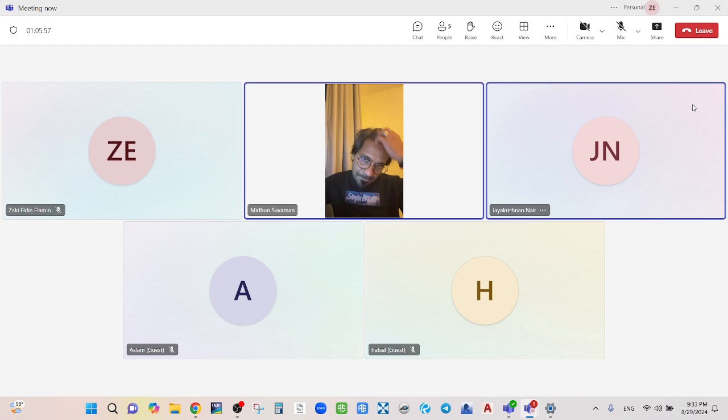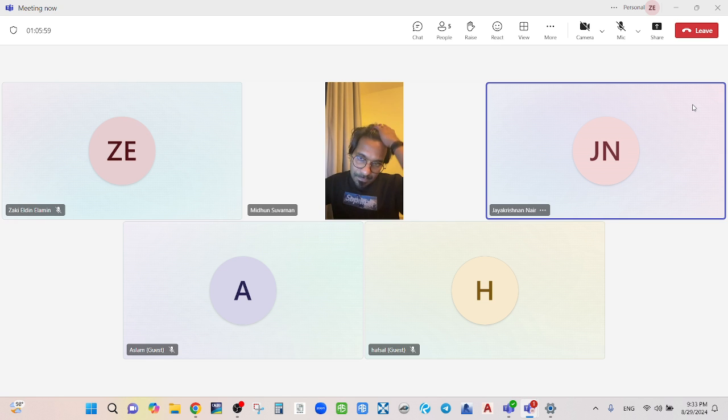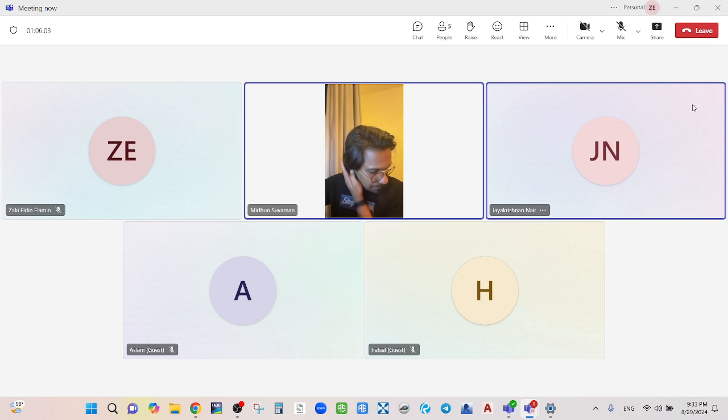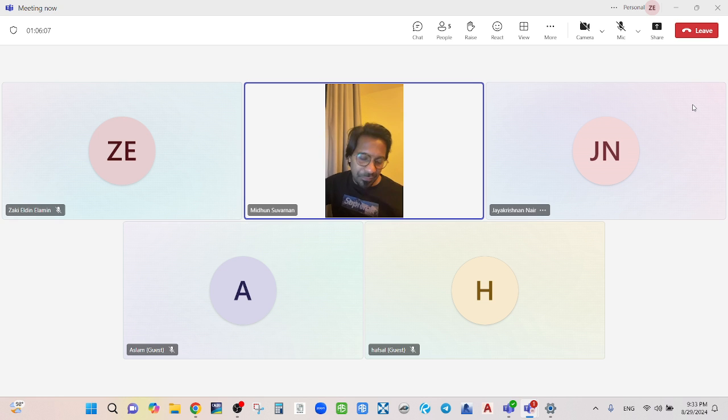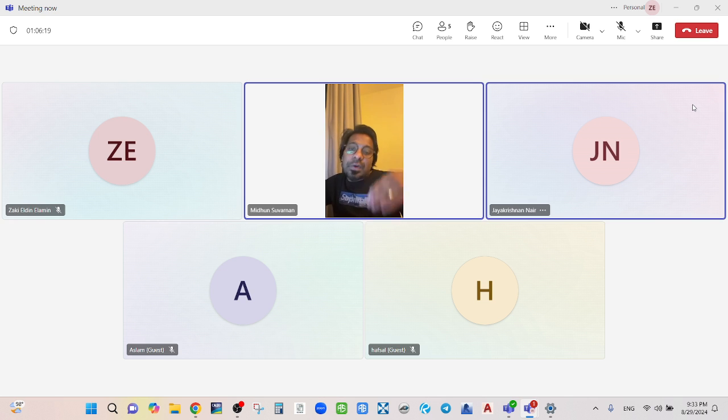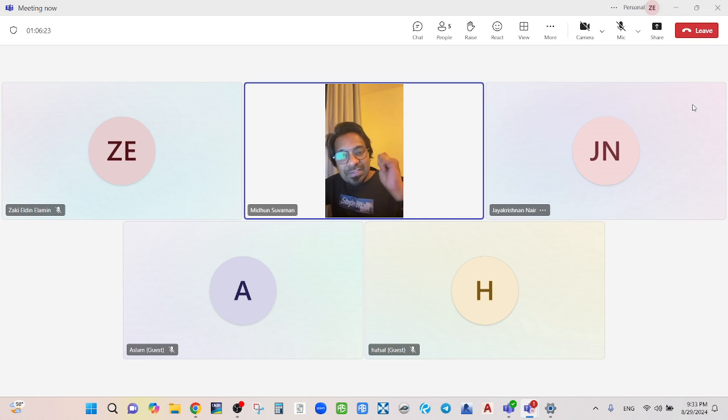So as you said, if the contractor is requesting the employer to release the retention, then at that time only is the retention bond required, right? That time only. I have seen two scenarios. Sometimes the contractor will ask to release it against a certificate. Or sometimes when TOC is issued, they will get 50% anyway, but they will ask for 100%. Then for the remaining 50%, we ask for the bond.